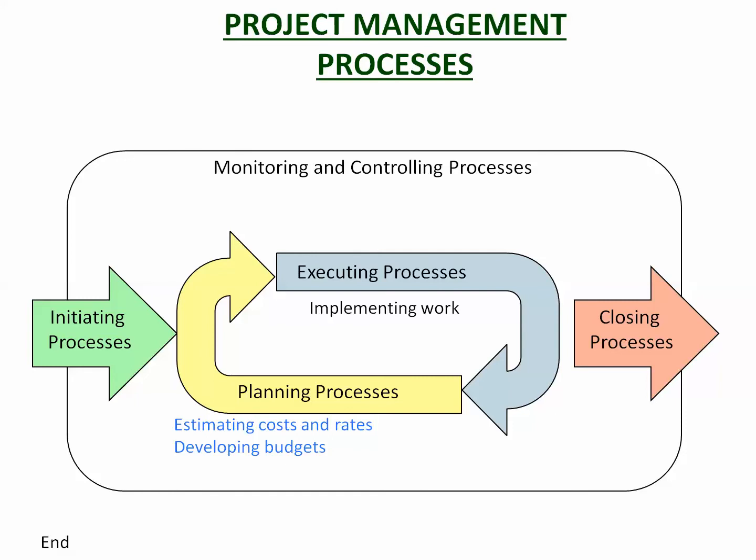And then there's the monitoring and controlling, which is the important part of costs. As the project is proceeding, you are checking those actual costs against what you budgeted and saying, are we bringing this in on budget or are we not? And that's why we break our budget down into small parts. So you're not looking at the whole project in one go, you're looking at each one of those little line items. So you're looking at cut to fill, you're looking at stripping topsoil, you're looking at sealing the road. You're looking at each one of those individually and you're saying, is this one being brought in for the part of the budget that it was allowed for? So you're monitoring those costs.